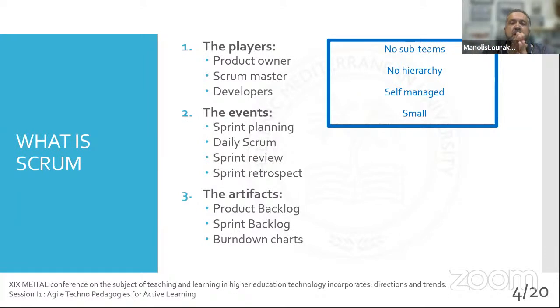They present what needs to be done, what is the demand, what is the need. So in this initial meeting, they brainstorm and they produce a list of steps or actions that the teams must take in order to fulfill the task, to produce the product. This complete list of steps or actions or things to be done is called the product backlog, and it is one of the three artifacts of this framework.